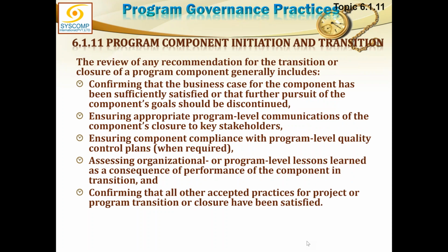So the review of any recommendation for the transition or closure of a program component generally includes confirming that the business case for the component, we are talking about the project, has been sufficiently satisfied, or that further pursuit of the component's goal should be discontinued. It also includes ensuring appropriate program level communication of the component's closure to key stakeholders.